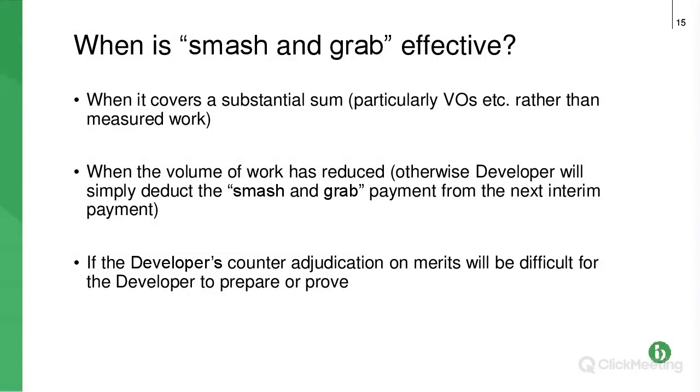So, the dispute will be more, have we done 20% of the work, or have we done 10%, or a different figure, which effectively will all come out in the wash the next month, because if the contractor is saying I've done 20%, and the paying party is saying, oh, you've only done 10%, by the following month, the 20% will have been done and possibly more, so the payment will be received the following month in any event, and it's going to take at least a month to get through adjudication. So, bear that in mind.